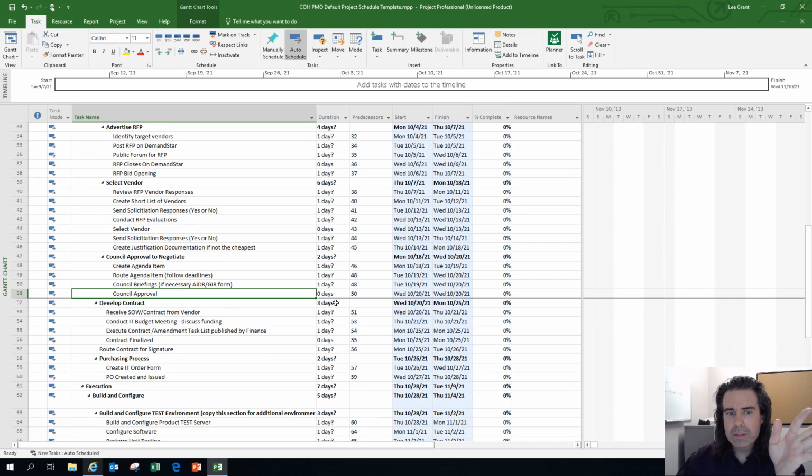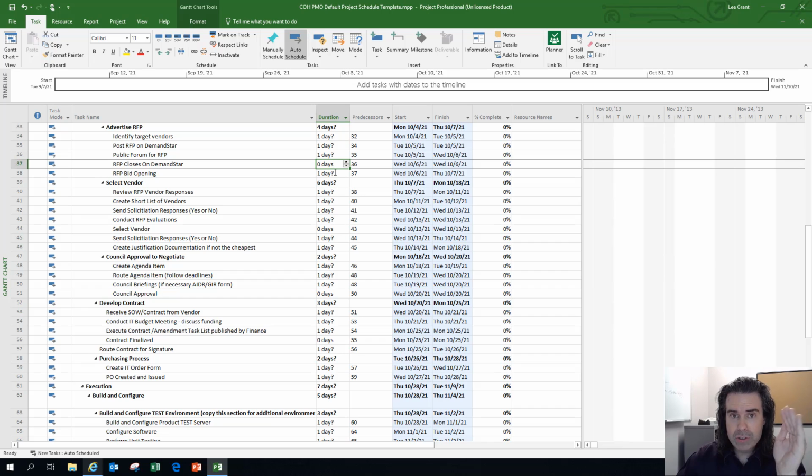That's just something to note, as you noticed when we get into the durations in a minute, that those 0 days just mean you've identified the task as a milestone task. Something to celebrate as you go through, and potentially something to look at going through the next toll gate to the next portion or phase of the project. You want to identify that you've made the right progress prior to going through that toll gate. And that's optional as a process, and germane to this conversation, but nothing you need to worry about for this assignment. Just that if it's 0 days, it means it's a milestone. That's all you need to know.